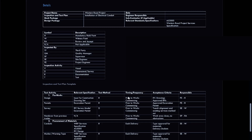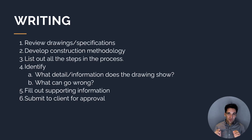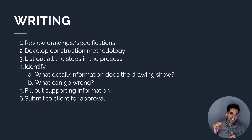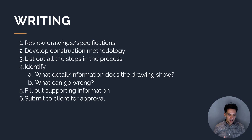Now we understand what an ITP document is and what they look like. The next thing we need to understand is how to write an inspection and test plan. As a construction project engineer or manager, you're certainly going to have to produce some of these. The steps in writing one are: first, review the drawings and specifications for the scope you're writing the ITP for; second, develop the construction methodology — understand the steps in the process; and then list out all of those steps.